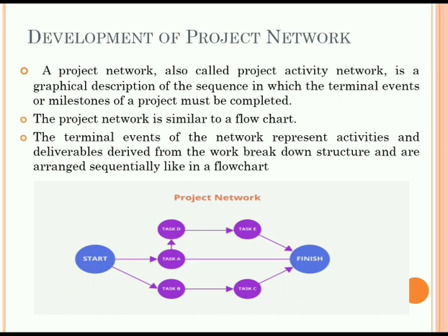As the name suggests, this type of diagram uses arrows to depict the terminal elements or activities. The length of the arrow typically represents the duration of time taken for the completion of a particular activity or task. The tail shows the start of the task, while the head shows the completion of the task. The order of activities, or their precedences, is represented by circles that are connected by the arrows.